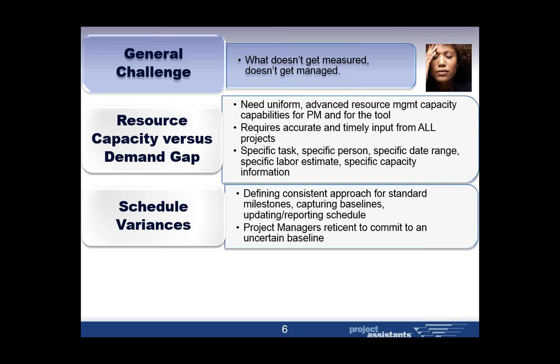And not only that, but if you ask a project manager why they haven't baselined yet, a common answer is, I don't have all the information yet. My follow-up question is, when do we have all the information? And the answer is at the end, right? So we can't wait. Right, so at some point we've got to baseline these projects. We've got to get some kind of level of commitment out there so we can start to measure those variances.